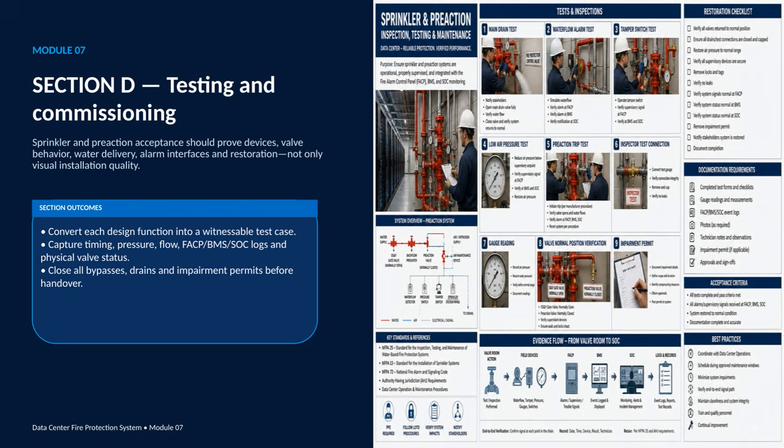Finally, commissioning is not complete until the system is returned to a normal operating condition. That means closing bypasses and drains, and resolving or closing impairment permits before handover. The result should be a documented, functional system, not just a visually complete installation.